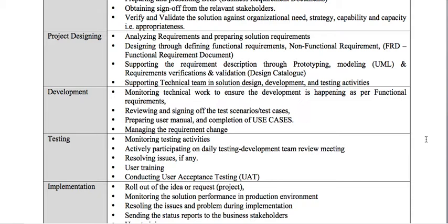Then you have managing the requirement change. This is a big part. During the development phase, you may find some requirements have changed, and you have to ensure that the change is initiated, addressed, presented, and that it obtained the sign off. And if required, additional funding may also have to be initiated. If not, then you have to create the log and communicate that change to various different platforms. If the change is major, then you may have to inform the steering committee and working committee, and obtain the approval before you go ahead.